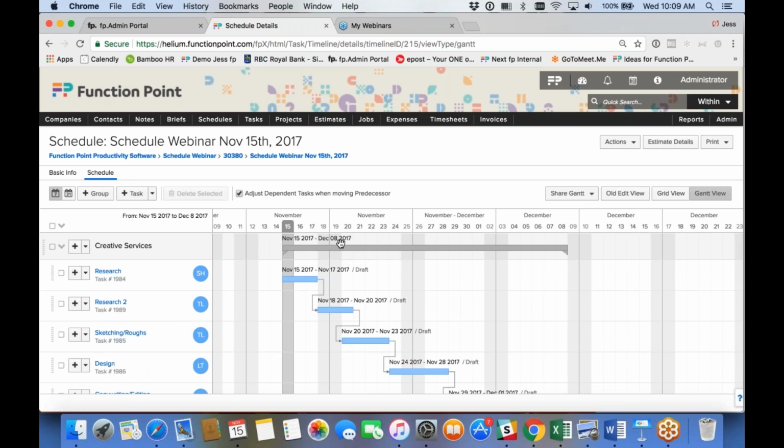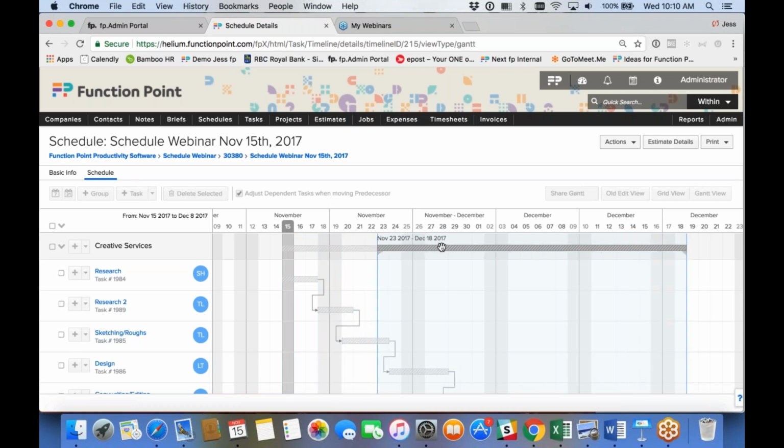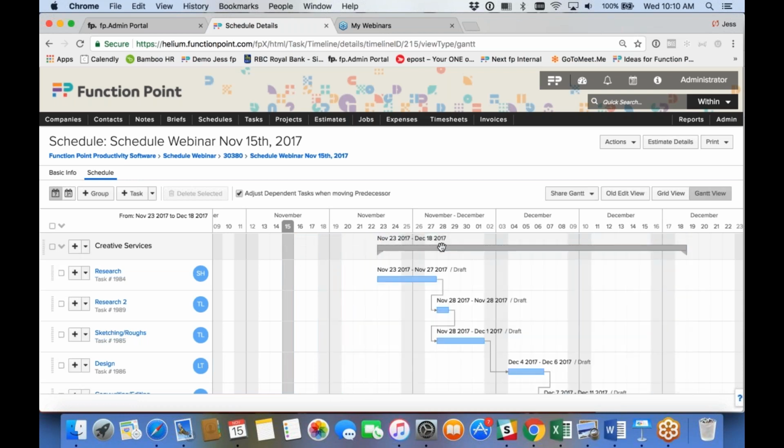So let's say your client comes to you and says, hey, we need to push this out by a couple of weeks. Something's happened on our end, and we won't be able to provide you any resources or insight into the project that you're working on for us. So can we please push this out? Absolutely, no problem. We come in here and we just simply drag the bar, and because these tasks are dependent on one another, it will push the entire schedule out by the required amount of time.